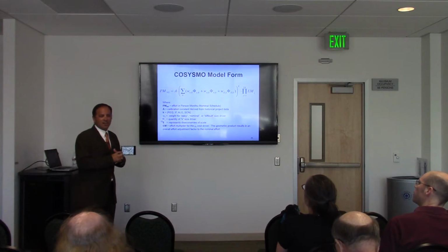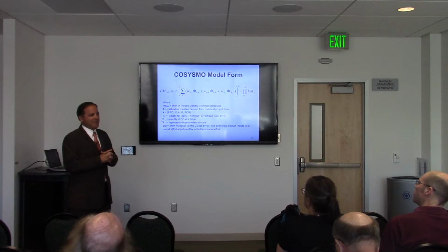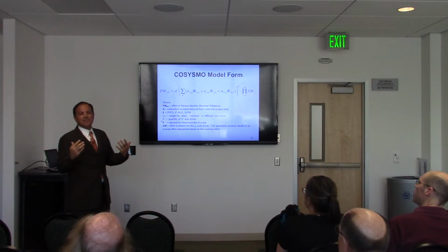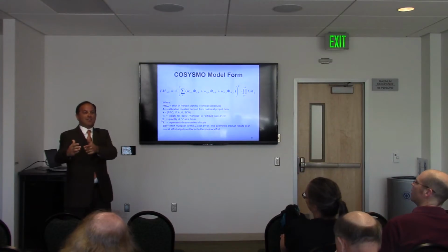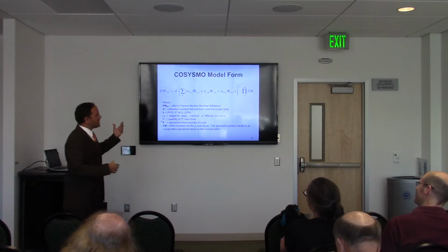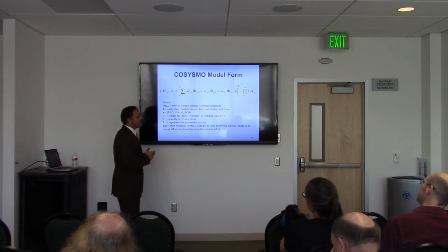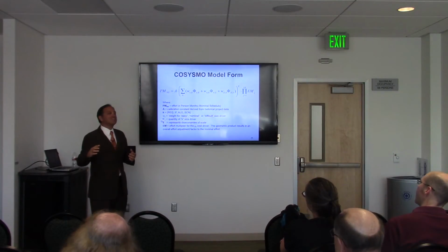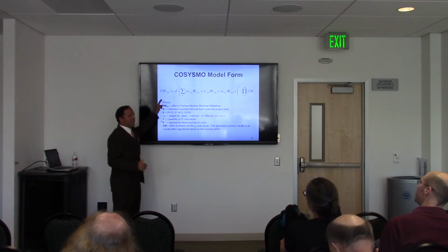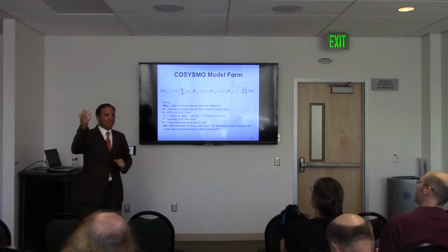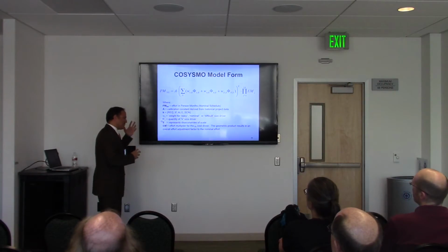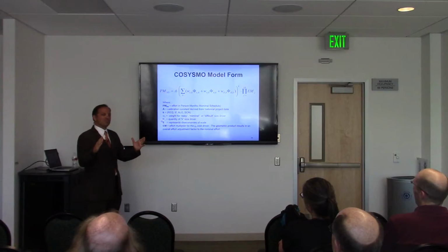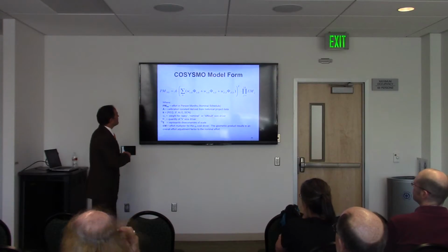They call that Parkinson's law. You experience Parkinson's law almost every day. Parkinson's law says the work expands to the time allowed, right? So if you give a student a deadline on Friday, it's going to take them until Friday to do it, right? It's just human behavior, right? So we can't really account for that in cost modeling because a lot of times people just work less efficiently when they're given more time. We also can't account for schedule compression all the time because that's an external business pressure that is really, really hard to account for when we collect data. But nevertheless, the initial assumption is no schedule compression for this project, okay?